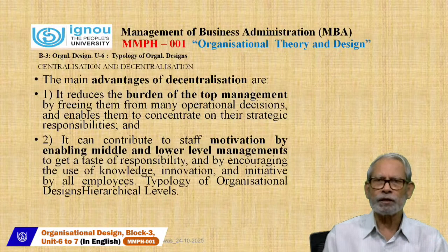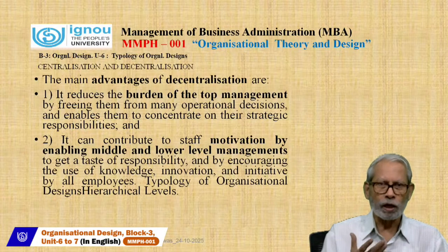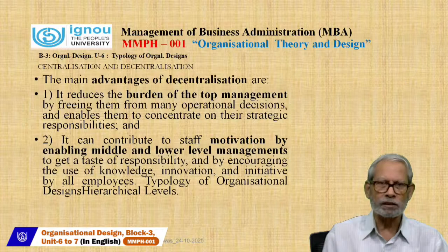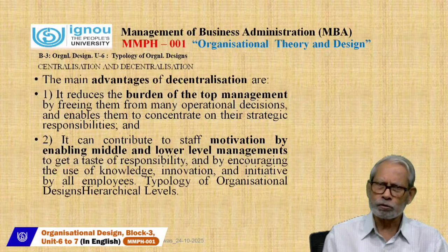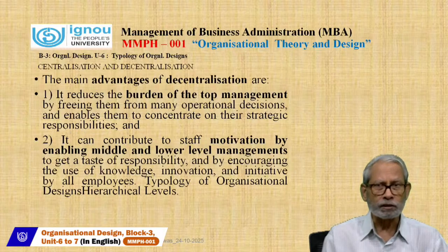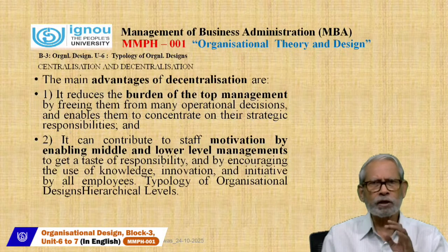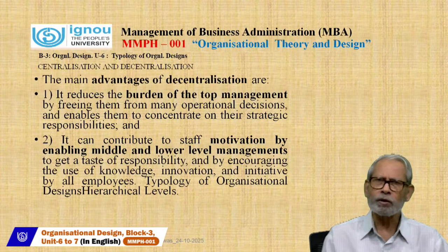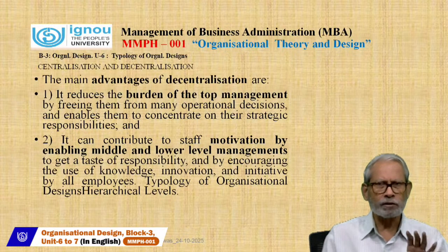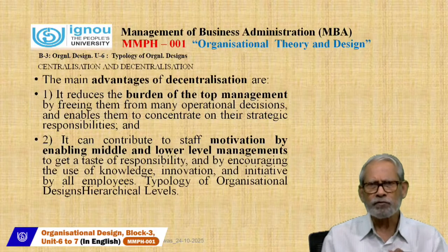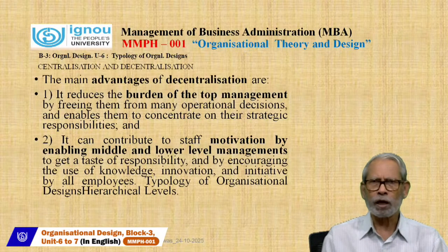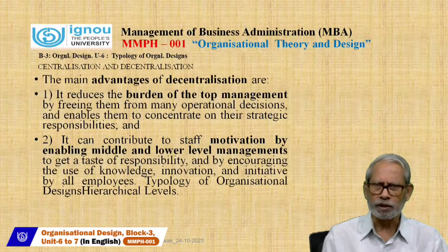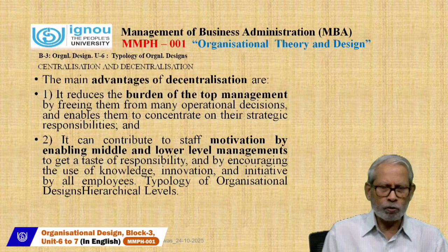If in a particular unit there is some 1 crore or 2 crore expansion work, or some new work, you need not take permission or wait for budgetary approval from the headquarters and the corporate centers. In that case you can proceed as per your written power, as already approved, and after that you can inform the corporate centers so that the headquarters are aware that it is already done. So this is the way it is functioning.